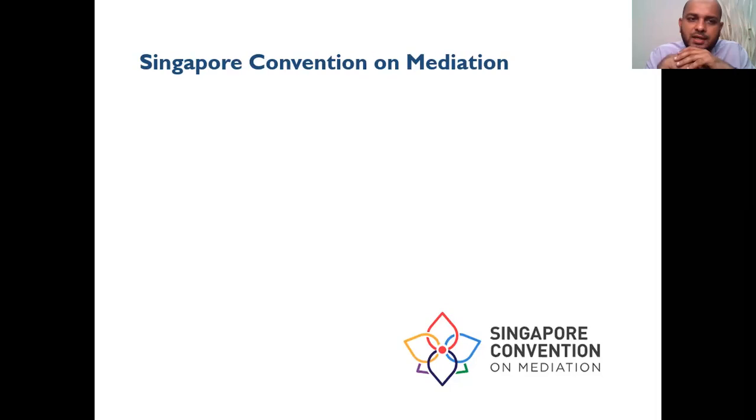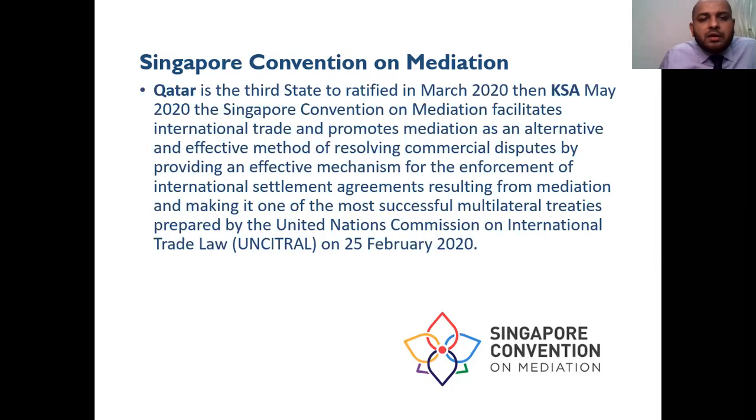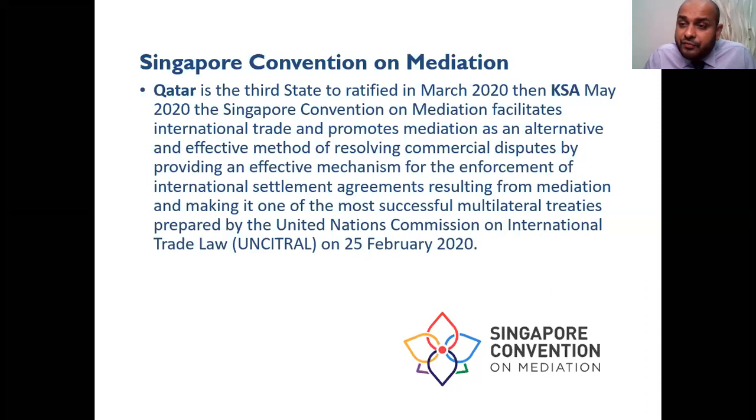So we are talking about mediation. Recently, most of the countries signed a mediation convention, the Singapore Mediation Convention. It is similar to the New York Arbitration Convention. What they are going to do is, if in one country there is a mediation agreement between parties, and each party is from a different country, and the other party has assets in his own country, that agreement can be enforceable under this mediation convention, the same as an arbitration award.